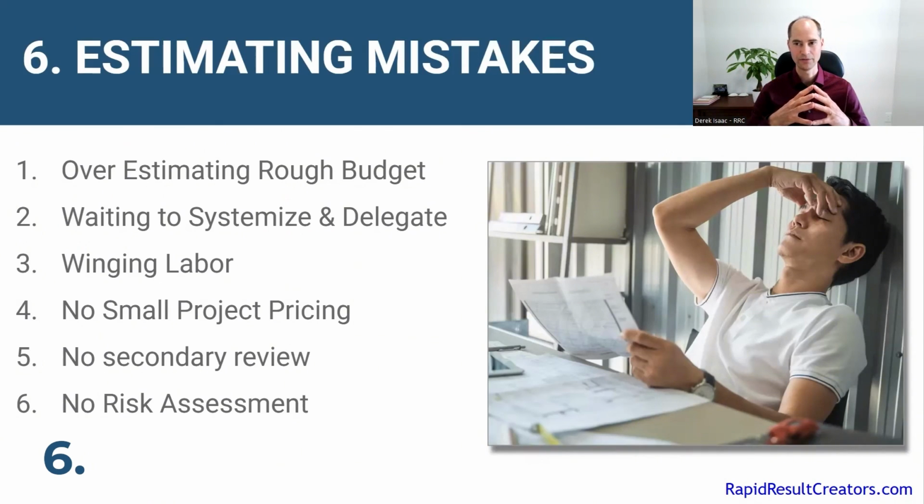So if you identify risks, like excavation is always risky. You never know what you're going to find under the soil and things like that. So what are the big risks here? And have you mitigated that in your estimate if something comes up, either with an exclusion, signifying, I like to put it right in the line item, allowance or risk, just in full capitals, risk, whatever it may be.